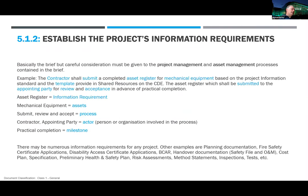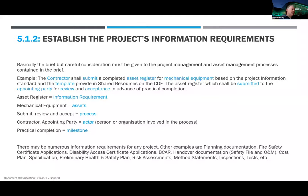The second activity is to establish the project information requirements. This is basically the brief for the project, but you now need to look at it from a project management and asset management point of view. You have to look through the brief and ask: what are we actually asking for? Are we clear about exactly what we're asking for? You want a building, but if you want a building to be LEED compliant or handle a certain amount of passengers per year — how do we know we've got that? That's a very high-level requirement, but you can get into more detailed requirements, like specifying two air handling units that need to do X, Y and Z. You need some assurance that that's happening.